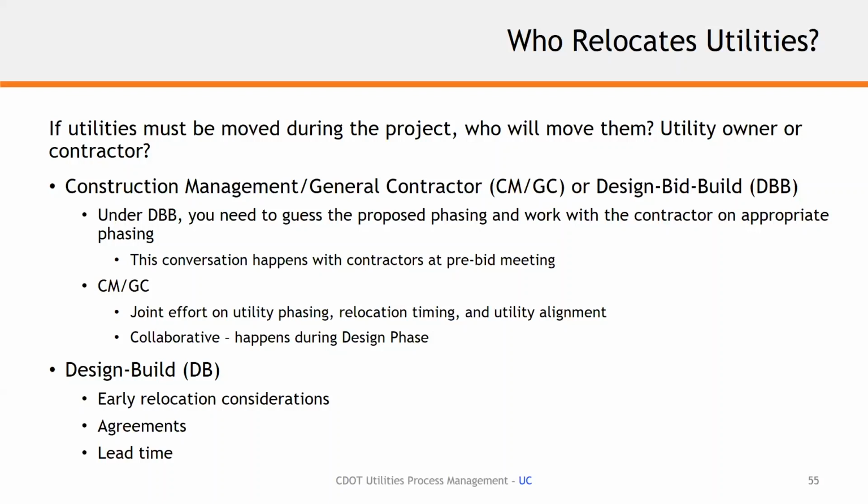But if they come in and they change it and they want to phase something that we haven't identified as a first, then we're in a critical path as far as schedule goes already, because then the utilities may be in conflict right out of the gate, and we're scrambling to get things moved just because we're not sure. And so one of the ways we can tackle this from a design bid build scenario is to have